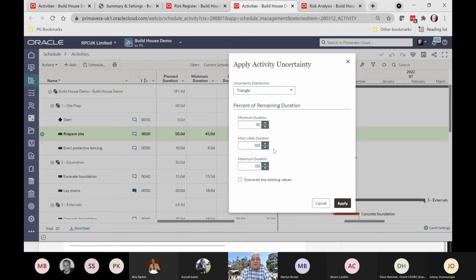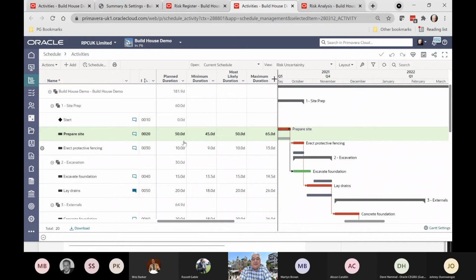And when we start running the Monte Carlo analysis, this is where the statistical analysis of Monte Carlo will determine what the probability is of doing all these activities when Monte Carlo starts rolling the dice, as it were. So I can either redo this, like I say, I can change the values manually, or I can overwrite the values and set them to these particular parameters.